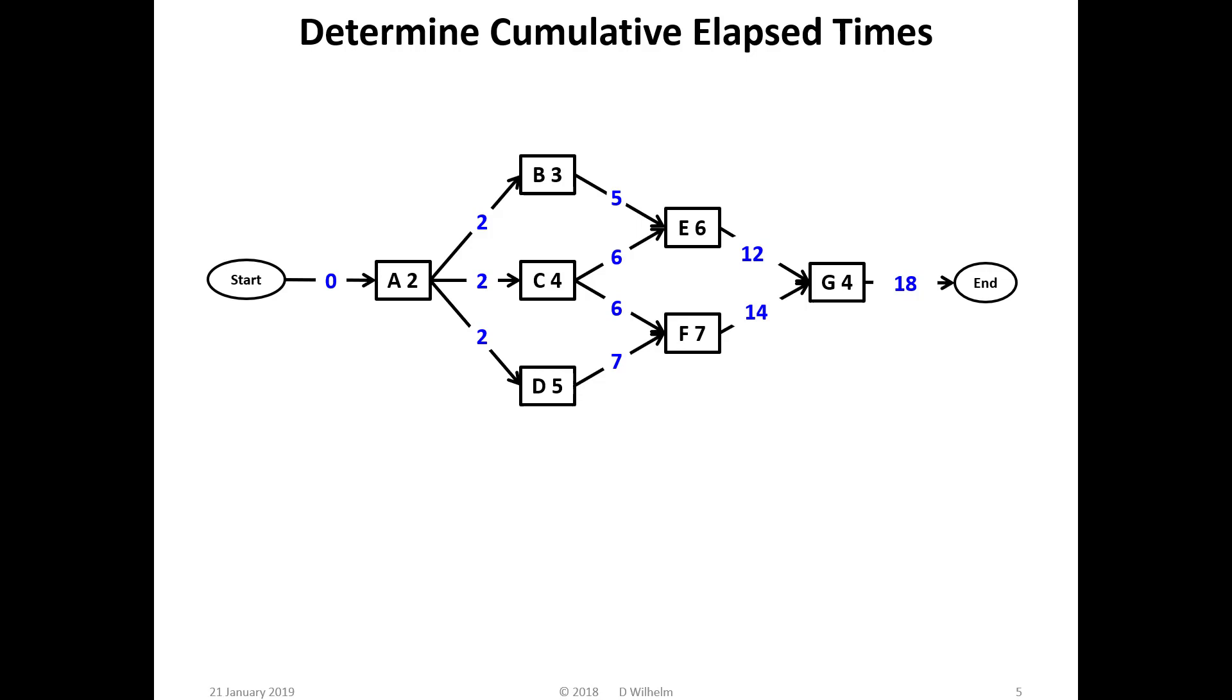Next, determine the critical path, the sequence of tasks that is the limiting factor in the project schedule. Whereas we work from left to right to determine the cumulative elapsed time, to determine the critical path we work from right to left. Only one link to the end, so task G must be on the critical path.